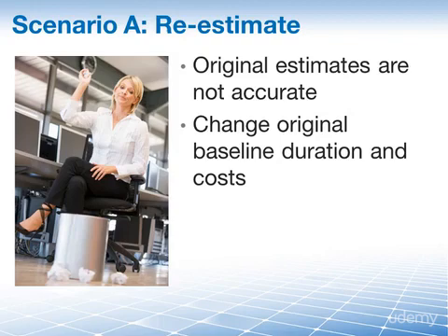By pure definition, we know that the estimate to completion is estimate at completion less actual cost. So yeah, we know we planned $500,000 was our budget. We've already spent $400,000. Well, $100,000 is left. That's the estimate to complete. But we know that our estimate at complete there is inaccurate. We just determined our budget is completely wrong. We have to do something else.